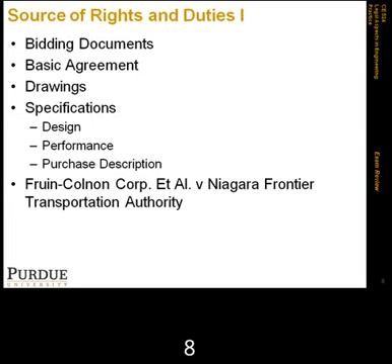There was also evidence that it's a design specification from the parties' prior dealings, which showed that the bidders had no input in design. And in the parties' dealings during construction, the contractor was denied many requests for implementing other waterproofing methods, and was told to stick to the current specs. So based on that, it was viewed as a design specification, and the contractor was not responsible for the leaks that were happening in the tunnel shaft.